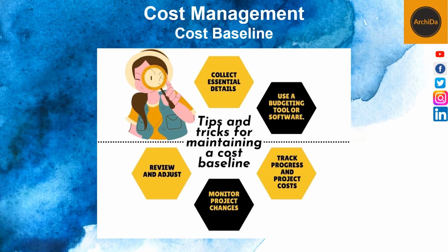Now, another part of the cost management plan outline is the cost baseline. Based on your cost estimates, you must define a cost baseline that marks the spending limit of your project. The cost baseline in project management allows project managers to compare actual expenses to projected expenses at the same point in the project, and it will help keep a project on budget. It will help project managers evaluate overall project performance, and it will help ensure the project doesn't go off track. It will also help project managers compare the actual effort to the cost variance, cost performance index, and more.